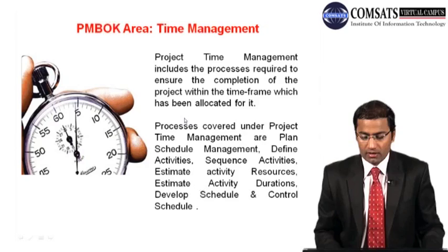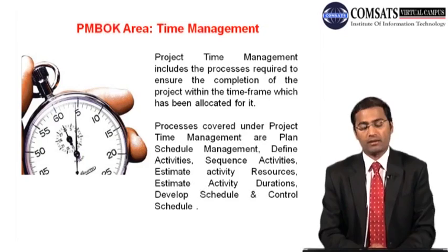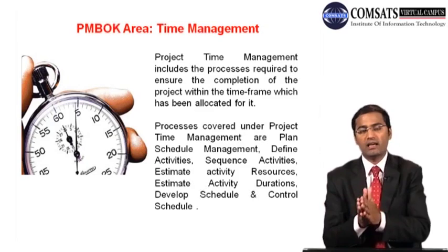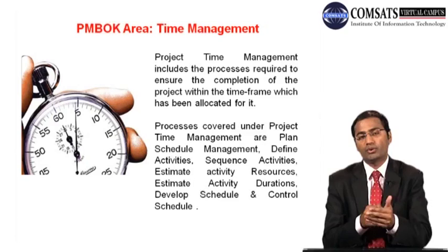define what are our activity resource requirements, and we estimate that based on activity resources. We actually define the duration. In jo main abhi example de raha tha ki agar humne sirf 1200 inte lagani hai aur hamare paas ek mason available hai to duration of the activity will be 1 day.